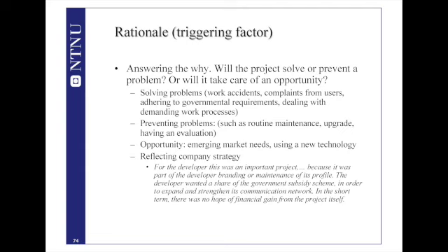When it comes to preventing problems, these are the maintenance projects or upgrade projects or evaluation projects. You don't have any problem, there are no complaints, and everything seems to be fine, but you try to look ahead, try to be in front of the problems. You do maintenance, you upgrade, you make small upgrades here and there, and you evaluate the effectiveness of the methods you are using in your work processes. These are typical causes for preventing problems.